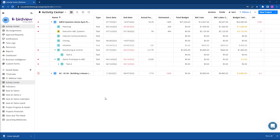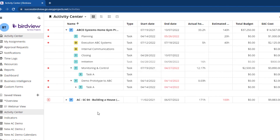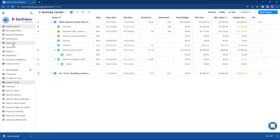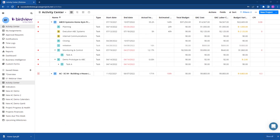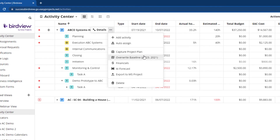Let's see how BirdView can help project managers review projects by monitoring key metrics like task milestones, warning of potential delays, or budget oversight. Tasks with specific deliverables and deadlines can be flagged as milestones, and these can be easily filtered and tracked in the Gantt view. Capturing the project baseline allows you to see how your projects are trending. You can select the ellipses to access the capture baseline or override existing baselines, ideally first captured during the project planning phase.